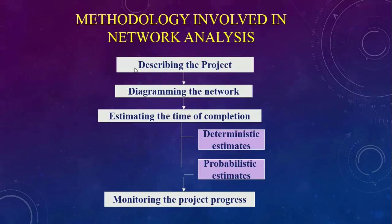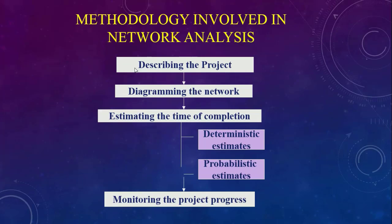As far as CPM and PERT network analysis is concerned, the methodology involved in network analysis has these stages: first, describe the project; then diagram the network; then estimate time of completion — having two types: deterministic estimate and probabilistic estimate; and finally, monitor the project progress. So basically: gather information, plan on paper like a flowchart, determine time of completion using deterministic and probabilistic estimates, and finally monitor the project progress.